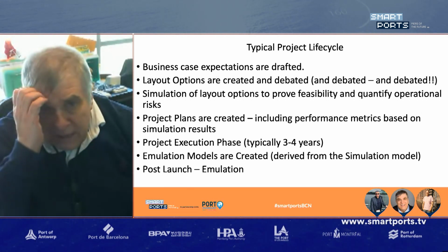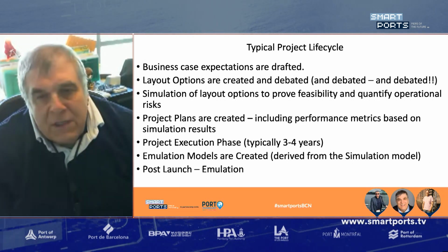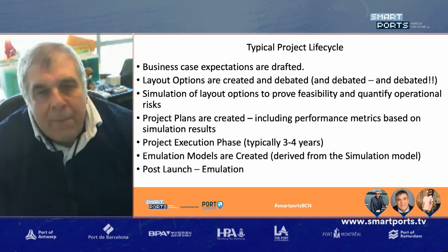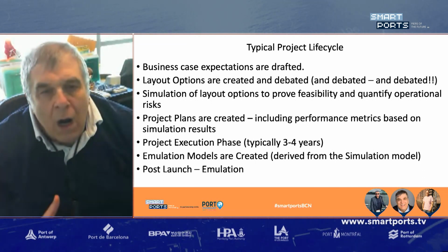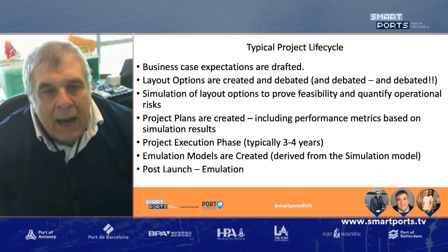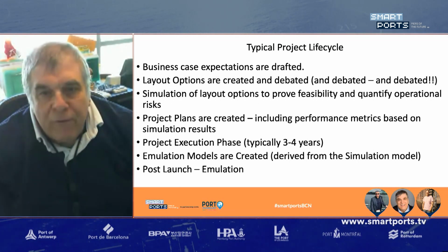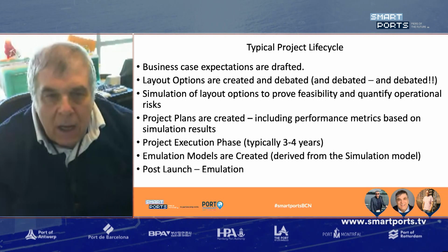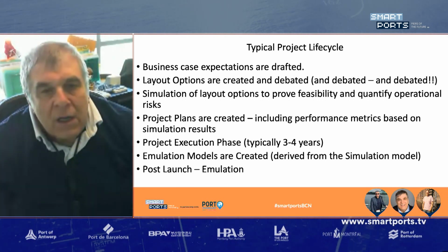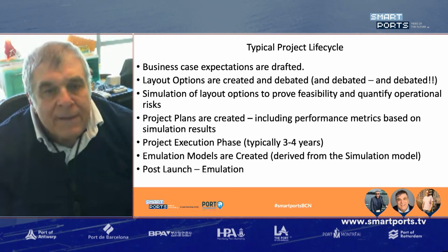A simulation of the layout, and this is a digital twin concept, is used to prove the feasibility and quantify the operational risks. In other words, to achieve the payback for the investors who are putting their money into the project, can I pay them back according to their expectations? A project plan is created, including performance metrics. How many ships, how many containers per week am I going to process? What kind of turn time will the trucks have? How long will it take to process a vessel? How big are the vessels, et cetera?